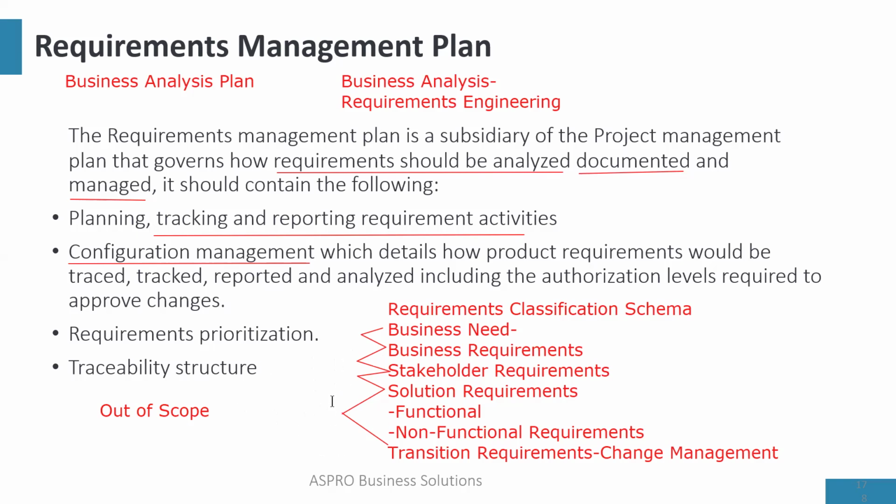So those are the kind of requirements. Let me give you an example. When we were collecting requirements from the sales attendant in the petrol station, one of them said that they want you to add a telephone to the pumping machine so that they can call their boss. How does that solve the problem? It doesn't solve the problem anyway. It's just an added functionality that is not necessary.